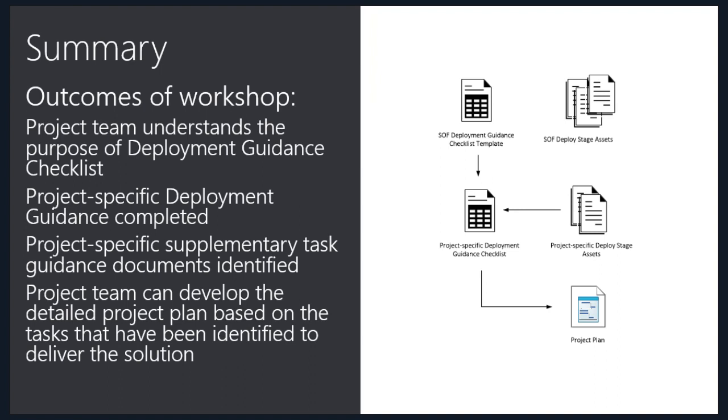The project-specific deployment guidance checklist will serve as an input document for the development of a detailed project plan. And once the deployment project is underway, the customized deployment guidance checklist will be used to track the completion of each task.